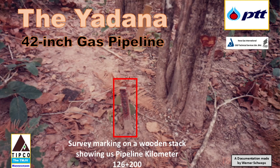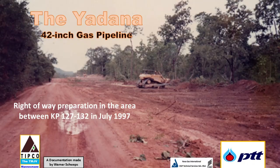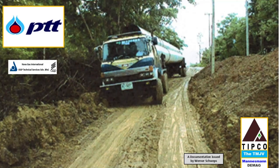Our survey team marked the right-of-way to ensure that only the approved construction area was cleared. Subsequently, we removed trees, bushes, boulders, and other obstacles, mostly with our excavators. Following the clearance, we leveled the terrain to obtain our pipeline right-of-way by using our large bulldozers. For the final level touch-up to make the right-of-way drivable, we used our graders. So, we prepared the right-of-way very well and effectively.